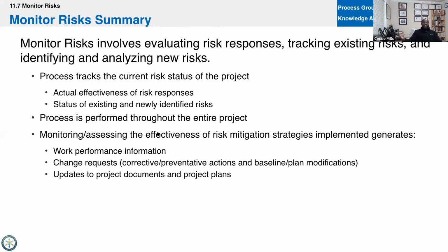However, the risk response had a spin-off risk, a secondary risk: we now have water and sand in our drain and we've got to pump it out. So we're looking at the effectiveness of our strategies, and all of our implemented activities, and what that does.